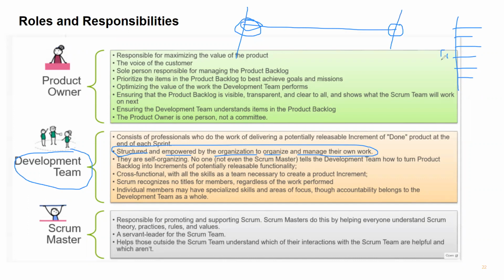Okay. He will tell this is 1, this is 2, this is 3, and this is 4. And he will give one goal statement, one sprint goal, saying that you, as a customer, should be able to communicate. For example, you have this Zoom, right? My sprint goal would be, okay, I'll take a very simple scenario. I will say a customer should be able to send emails to the recipient. Okay, so he will have all the information, and it should be secured. So this will be the sprint goal.